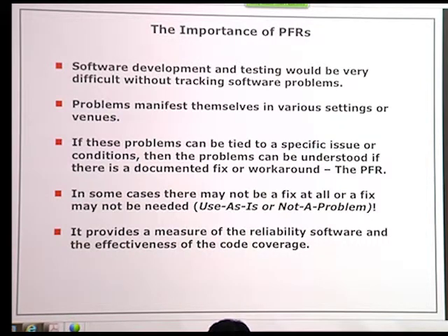So, looking at when you finally resolve the software issues, you have a lot of PFRs. They give you a measure of the reliability of your software, so the number of PFRs you have gives you an idea of the effectiveness of the code coverage, if you look at the PFRs tied to a specific module, for instance. And sometimes you can have a lot of PFRs tied to particular instruments or that sort of thing.